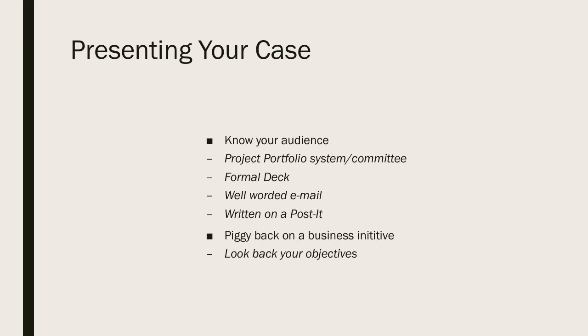perspective. When we're talking about these types of projects, the licensing cost for something like SAP HANA compared to your $150,000 switch upgrade or your SD-WAN, let's say the project is going to cost 1 point something million. And at the end of the day, you're going to save money and improve performance for the SAP HANA installation. It becomes low hanging fruit because I can guarantee you that $1.5 million project to upgrade your SD-WAN or your $2 million project to buy vBlocks pales in comparison to the $30 million the application team is going to spend to get their environment converted over to SAP HANA, get the appliances stood up, the consulting dollars. The stuff that you ask for from an infrastructure perspective is going to be a rounding error.